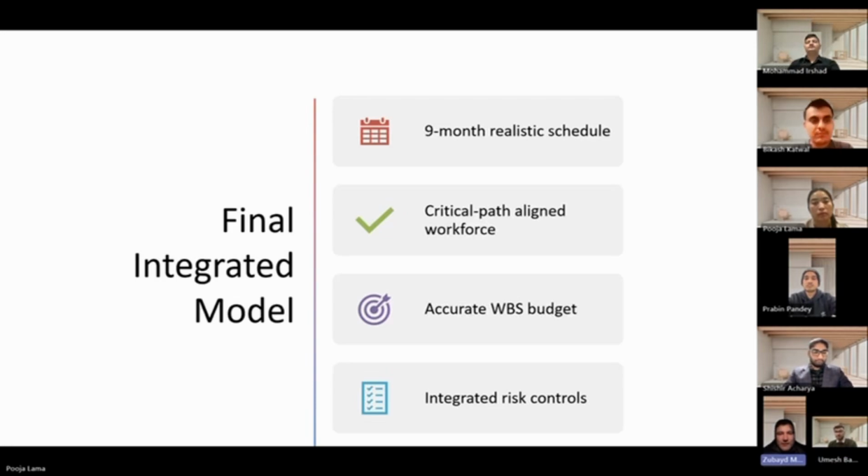I'm excited to present the part of this project that truly keeps everything running smoothly, our WBS and KPIs. So think of the WBS as the engine of this entire project. It breaks our 9 months mission into 7 clear strategic categories, from design and permits to fabrication, assembly, smart systems, and final handover. This structure doesn't just organize the work, it drives the work and tells every team exactly what needs to be completed, how it connects to the next step, and what success looks like at each stage.